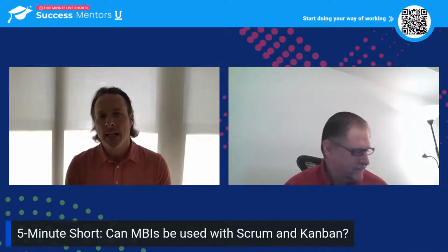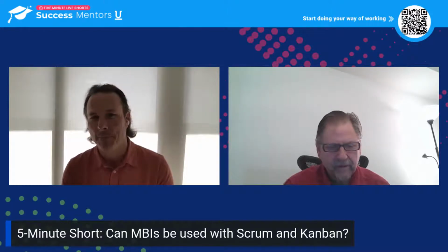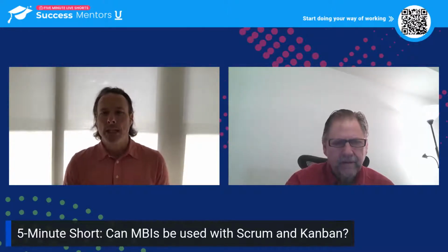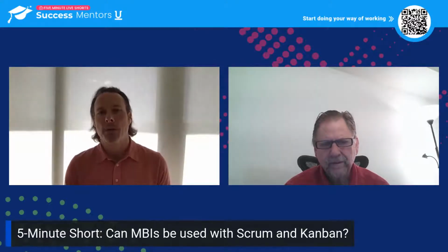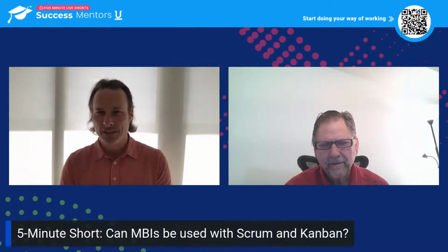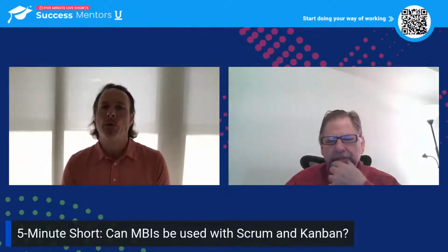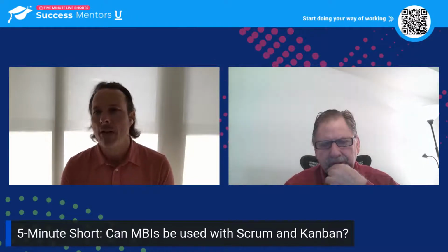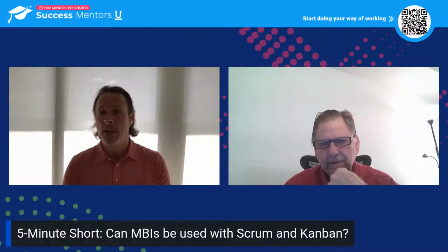Today's 5 minute short is: can MBIs, minimum business increments, be used with Scrum and Kanban? The minimum business increment is where we're identifying the next smallest thing that we can do that provides value to a customer. It's not at such a small level like a single user story that would enhance or improve a capability or feature we already have out in our product that customers are using. That's not what the MBI is.